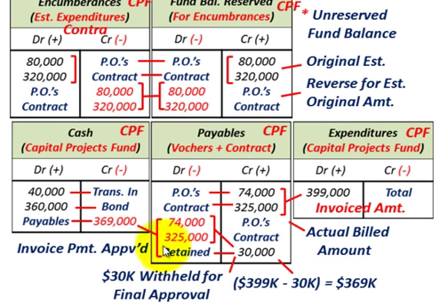This is the case where the invoice is going to be approved for payment, a total of $369,000. Now, normally municipalities or governmental bodies are going to withhold on these capital projects. They might withhold some amount for final approval, for final checking of the project.